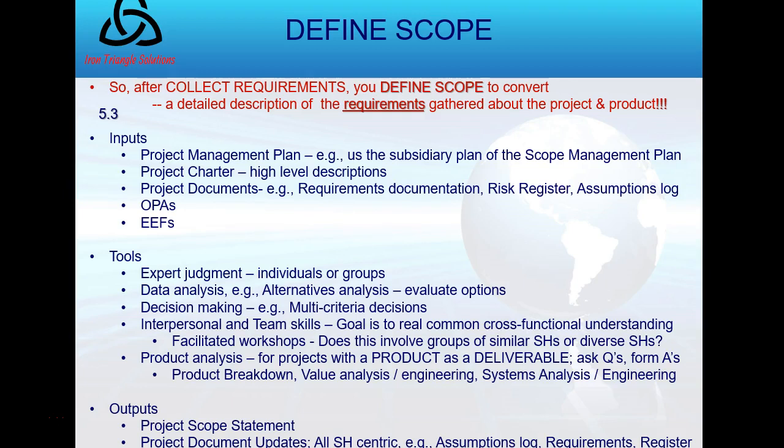So until we could clearly control the IT security portion of the tablet, we did not allow, we said it's not part of the project to allow people to use the tablets to do email, because email, through various capacities, can invite malicious attack. And so we excluded that from the project because we knew people would ask, hey, I've got a tablet, why can't I do email on it too, or Google searches? Because that invites, without the right protections, and at that part of the project, we weren't ready for it.